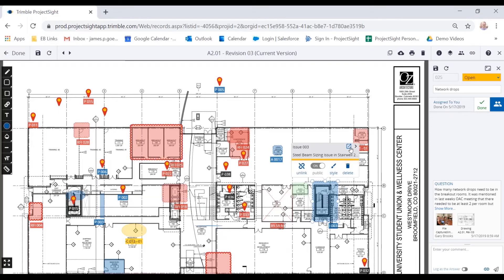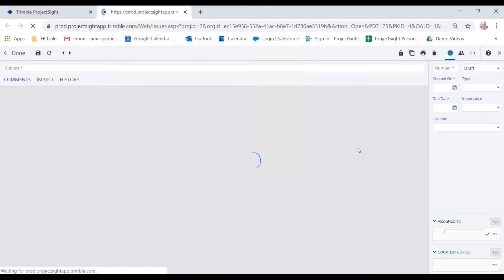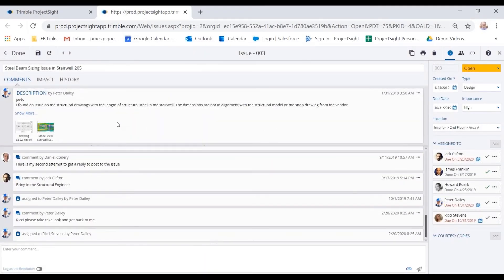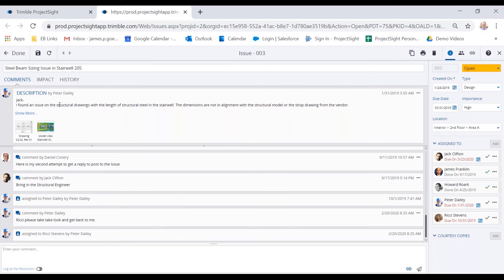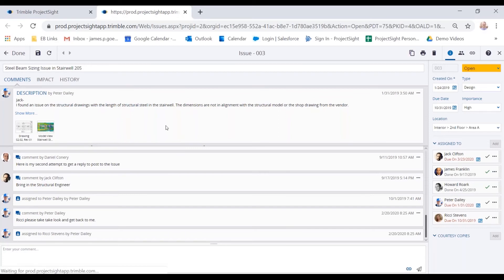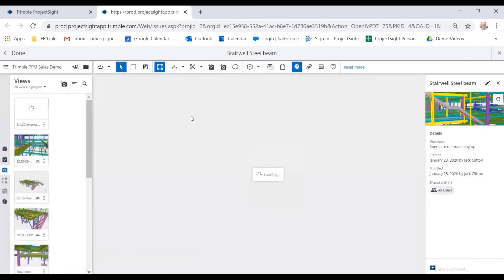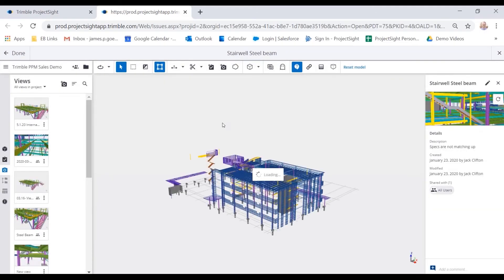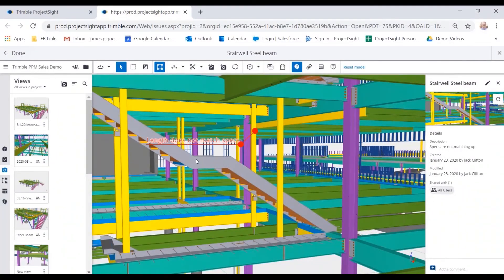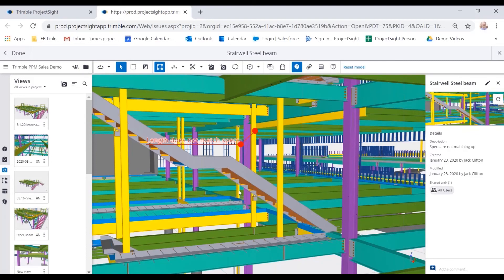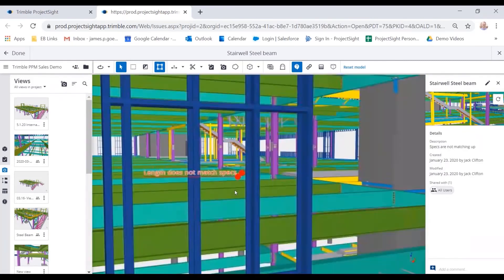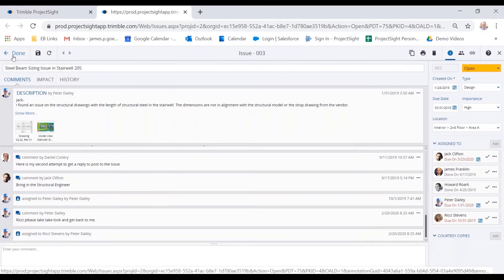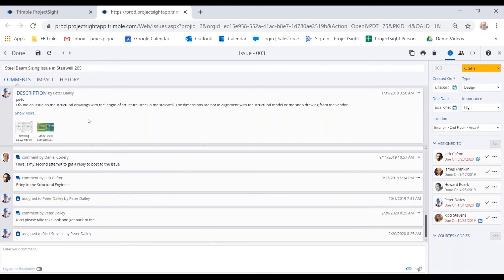Let's look at one more here. And in this case, I'm going to open this up into a new window. And this allows me to see the full collaboration between the teams around this specific issue 003. So it looks like there was a structural drawing where they needed to confirm the length of the steel in the stairwell. So they wanted to annotate that on the drawing, but as well, they wanted to attach a model view. And the model view comes from our Trimble Connect platform where you can store and collaborate upon the BIM models. So what I've done here is I've taken a quick snapshot of this section. I've annotated on it and I've allowed the ability for people to view that. So Trimble Connect comes with Project Site. So any user can have access to it if they need to look at a BIM model to reference that. In this case, I've taken a quick snapshot and I've attached it right here within the drawing module on this issue.